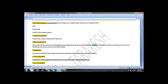At the same time, sometimes the client may come back and say that I didn't tell you. What we do is, once we documented all these things, we will send these documents, BPs - business blueprints - to the Tata Motors client people. They will review. And once they reviewed, if any deviation found between their requirement and what the IBM team understands, then they will suggest. Then the IBM team again will modify, will send it back to the Tata Motors. So once they reviewed, they need to print the copies and then they will sign it. Physically, they will write approved. Then these copies will be scanned and uploaded onto the portal, project portal. So that tomorrow, the client may not come back and say I didn't tell you. You only did it - here we will show this is what you have signed for. This is what we implement.